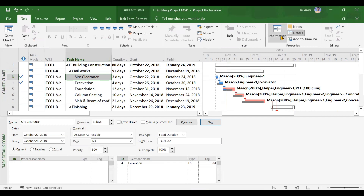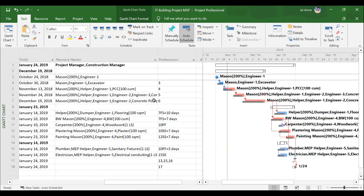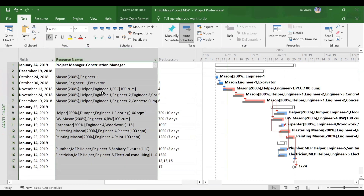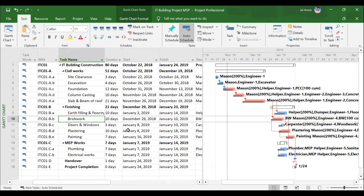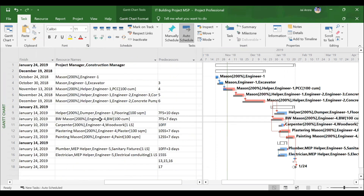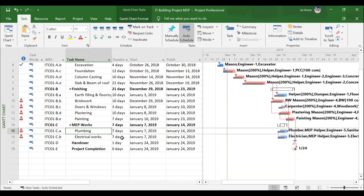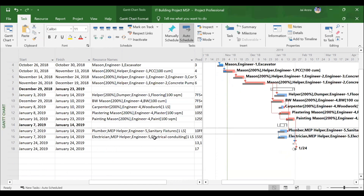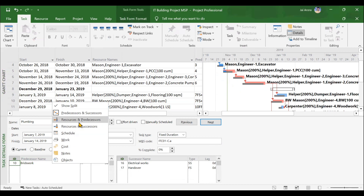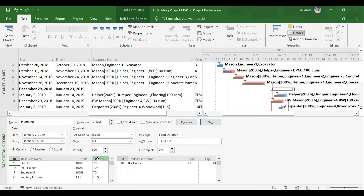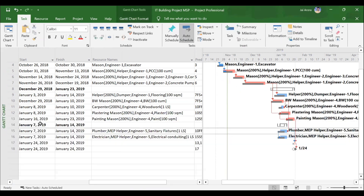After understanding task types, we will move to assigning the resources. Since we will be thorough with task types, we will then assign resources. There will be three to four methods through which we can assign resources. For example, brickwork has two blockwork masons, one engineer, and one brickwork material of 100 cubic meters assigned. A plumbing activity has one plumber, one MEP helper, one engineer, and sanitary fixtures as a material resource. In the detailed view, under the resource tab, we will also assign certain units and work values, understanding everything related to resources in detail.